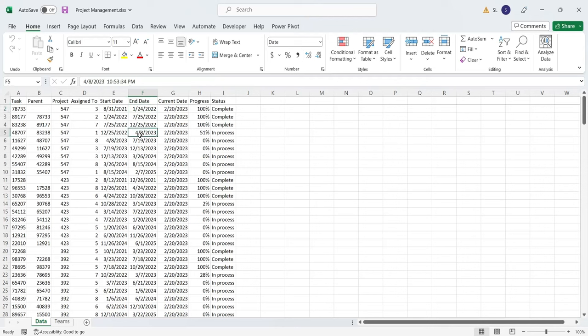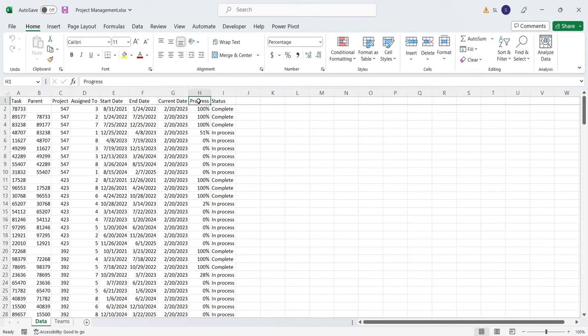A task only starts after its parent task has completed. Current date is today's date. Progress is shown in percentage. The tasks that are 100% complete have the complete status.